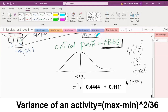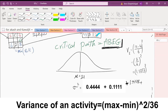A student asks: is it always the expected finish time minus 4? No — do you have the formula? It says (b minus a) squared. What is b? B is the pessimistic estimate, minus the optimistic estimate, divided by 6, to the power of 2. For G, the variance is 1.7778. We go to four decimal places.